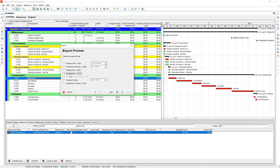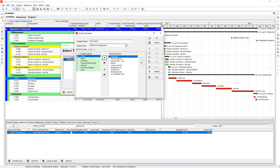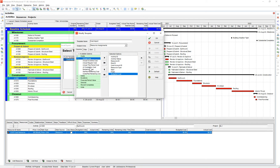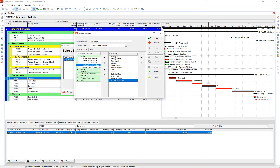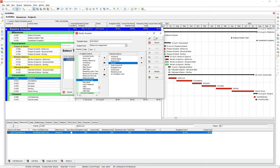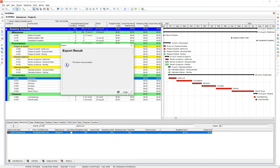Now that I've created my resource and assigned it to an activity, let's go ahead and create an export of the resource assignments into Excel. I'm going to export into Excel — resource assignments is the only thing I need for this. Let's export that and create a template. Essentially, what you want under costs is: budgeted costs, actual costs, remaining costs, and at completion costs. I have my resource ID — perfect. So I have everything that I need, and I can choose a destination to export this file to.